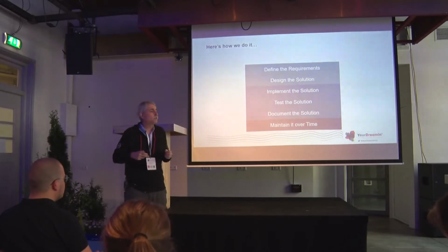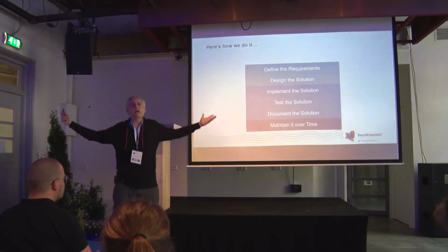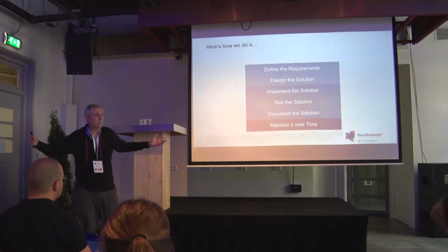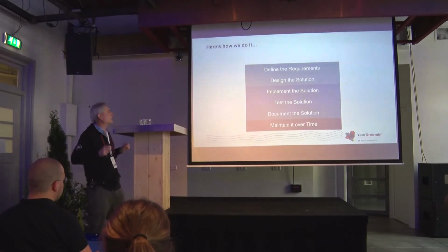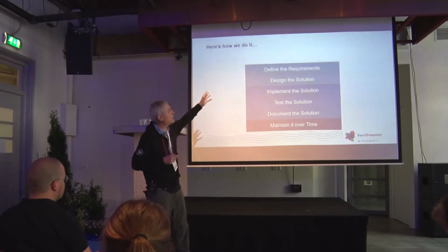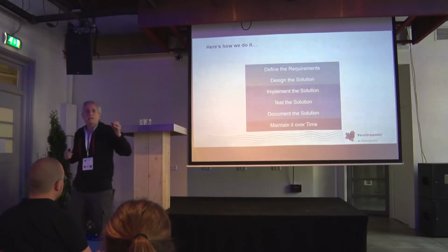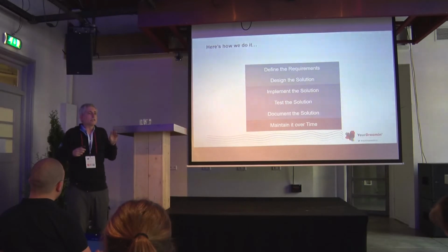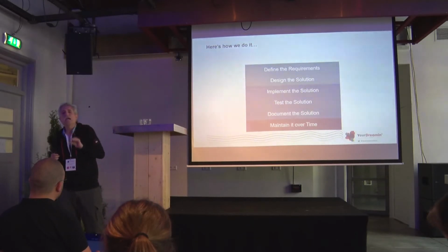Sometimes agile people means we get to leave it out. Like, let's not figure out what the requirements are and just build stuff. And if we do it often enough, sooner or later we'll come up with something people like. Don't do that. That's not the correct agile. And if you leave out any of these steps, the odds of your project failing increase dramatically. And let us be clear, studies show consistently that software projects fail at least 50% of the time.